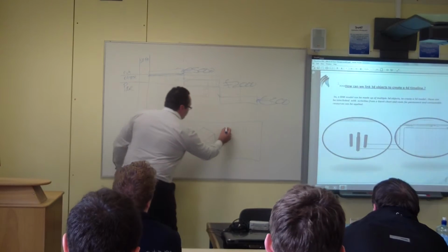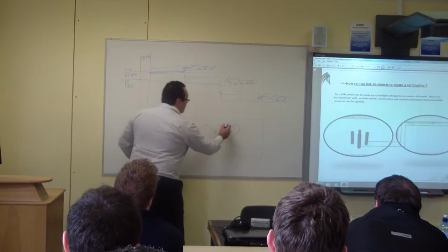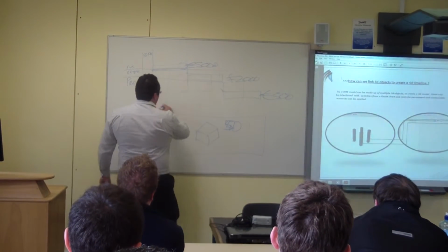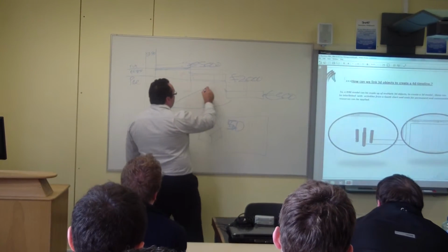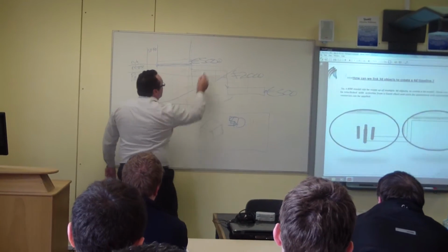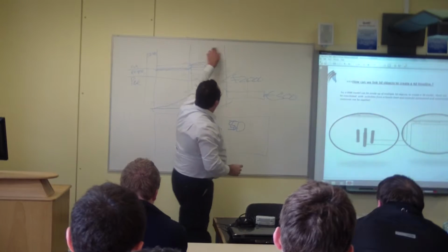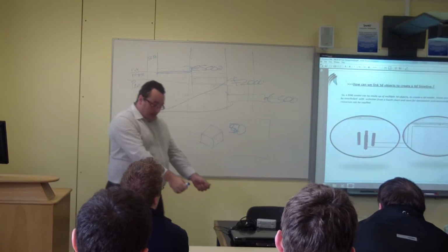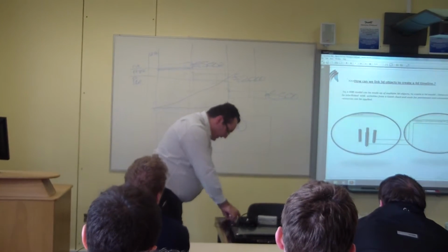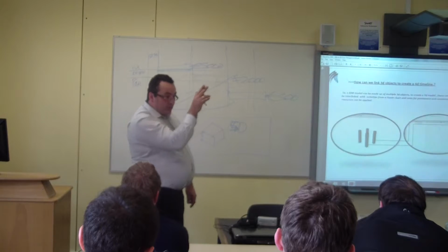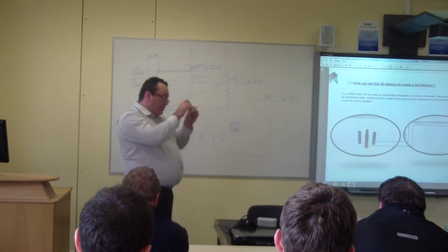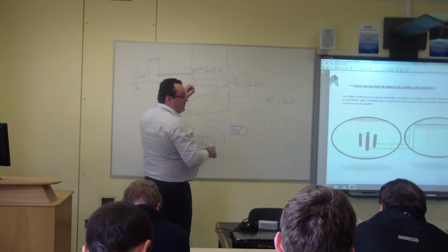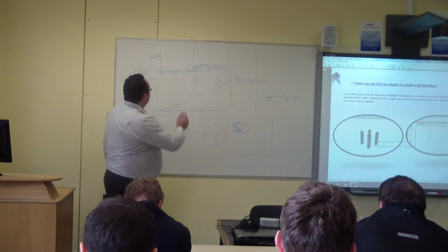So this is our 4D model. Sorry, 5D. And what happens is we have a cash flow like this, and we have week numbers down here: week 1, week 2, week 3. You can always take a Gantt chart on a piece of paper, look at the bottom of it, count the activity weeks, and plot a graph of that as well. You don't have to use a computer. So that's our cash flow, our baseline.